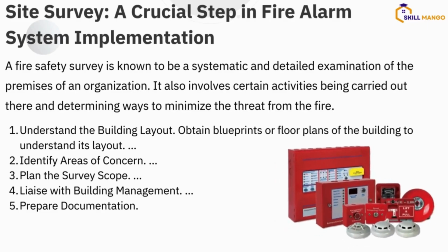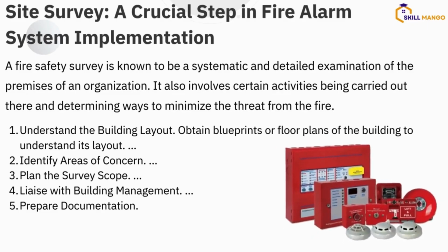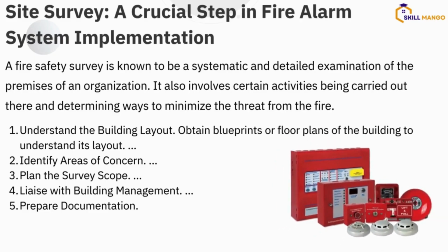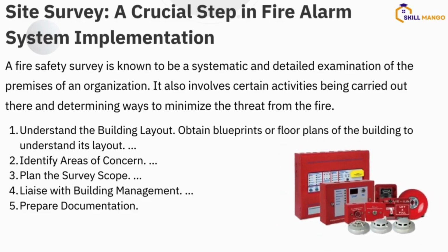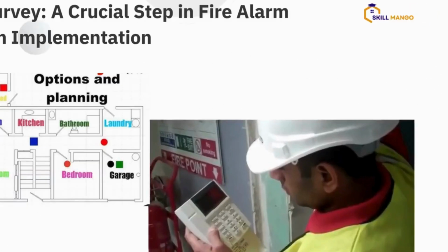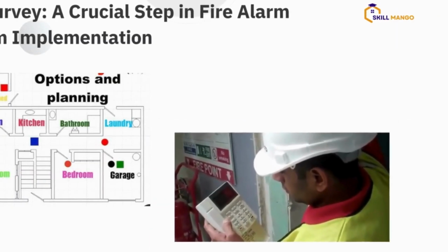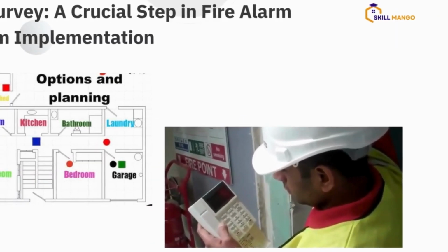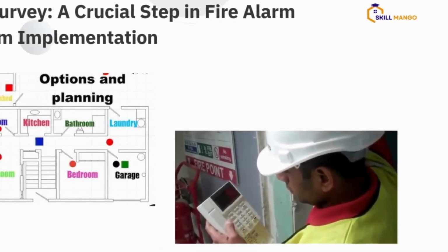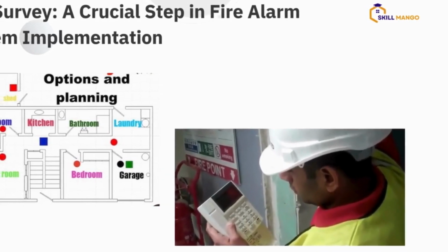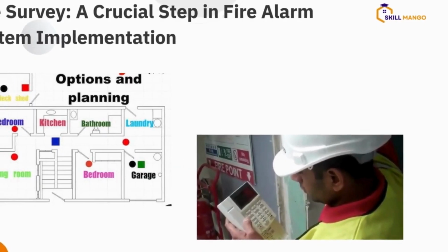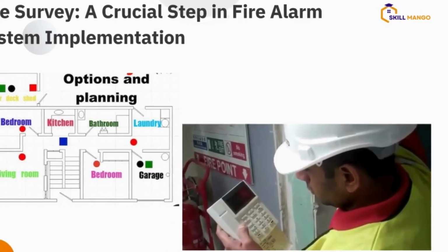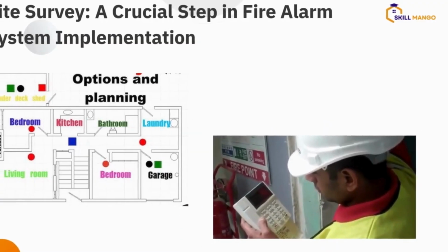This is very important to avoid problems at the mounting or configuration stage, because the cable integrity has to be confirmed and verified, so you do not have any problem when you are mounting the equipment. You have to ascertain all the locations and points where you are putting your smoke detectors. In the case of conduits, you have to use the stop box, and your pipes are laid in conduit with all the points linking to each other.